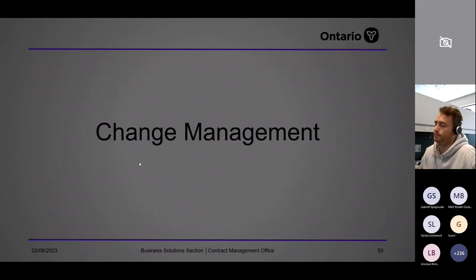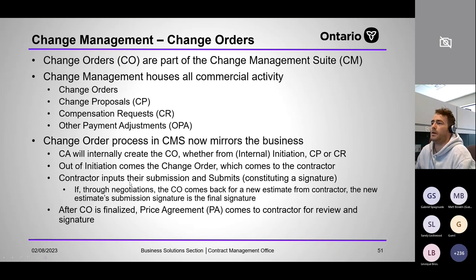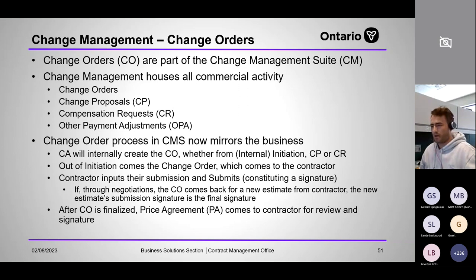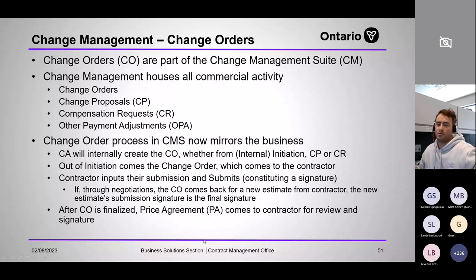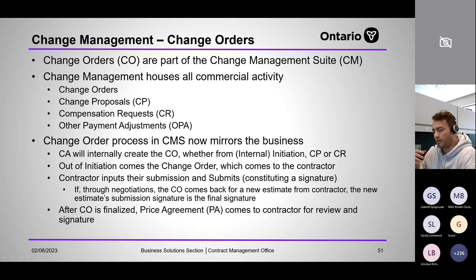Moving on to change orders. Change orders are part of the Change Management suite, created to house all commercial activity. Benefits include a one-stop shop for all commercial activity on the contract: change orders, change proposals, compensation requests, and other payment adjustments. The change order process in CMS now mirrors the business process — the CA creates an internal initiation, garnering DOA approval, and everything's ready to go when they click Issue.